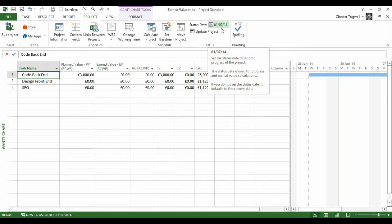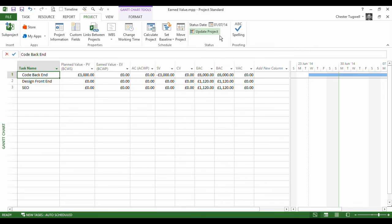Budget at completion field. So the planned value tells us what we should have spent. It looks at your status date and it says, right, halfway through the task, now according to the baseline, you should have spent £3,000.